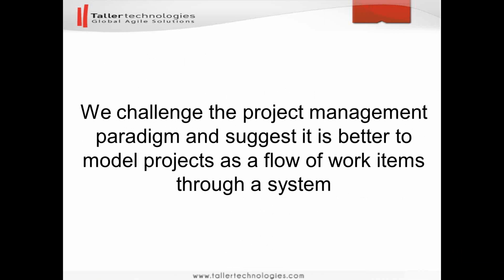We propose a probabilistic approach for preparing high-level plans based on existing historical statistical data recorded about a software development organization or a team, and utilizing Monte Carlo simulation, predictions can be made that could be used for planning new projects. Does the customer actually ever ask for a project to be delivered, or maybe a project is just a vehicle or a container for managing risk?